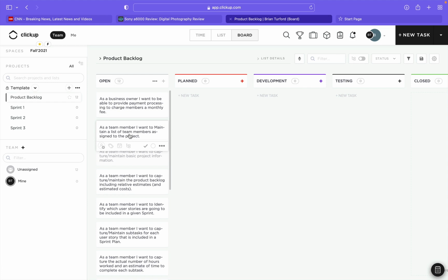The unfortunate thing, I think the goal was the right thing to do, to try and plan ahead, but I think the problem is just the duration of the plan. We used to plan for such a long period of time. There's no way that you could predict what would be happening in 4, 5, or 6 months down the road. I think we've learned through a number of failed projects that this was not a good way to do planning.